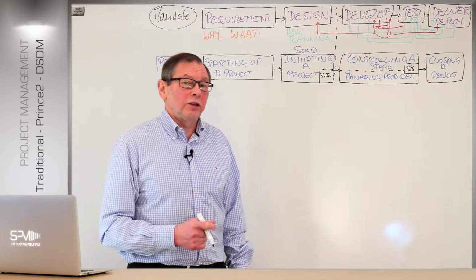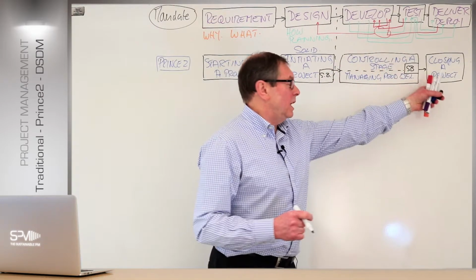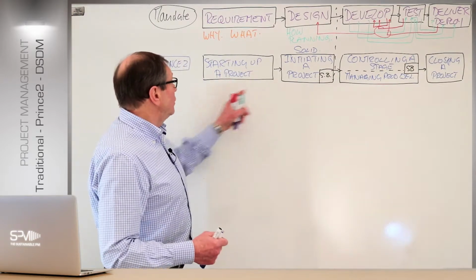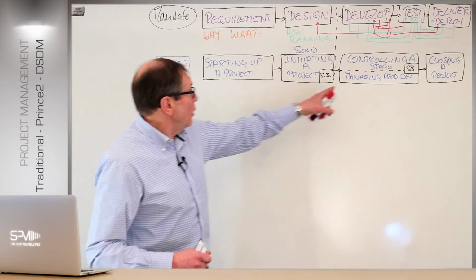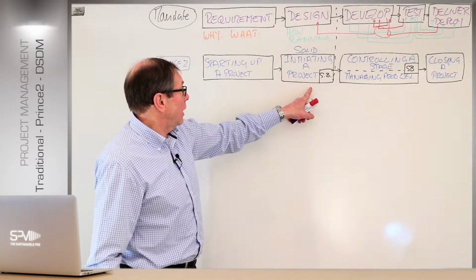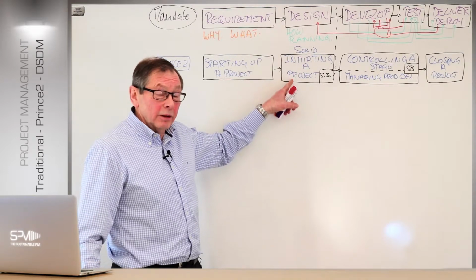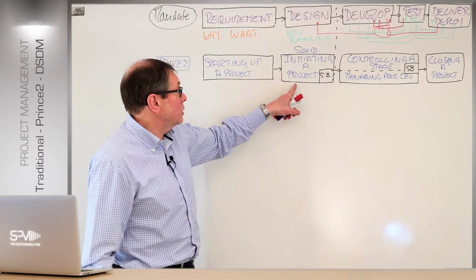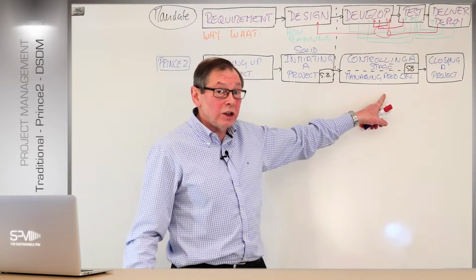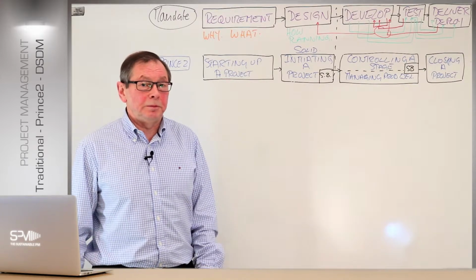We've had the objectives and they've been signed off. All right? The trouble is, if we follow the original waterfall and use that through here, of course, then we have problems. We get to the end of the project, and that's when we start to have difficulties. But you can see, at the end of the day, there's still really only four or five sections here: starting it up, formalizing it, initiating a project, getting all the planning in place, how we're going to manage it from a project point of view and the development approach, run that plan through the controlling a stage and managing product delivery processes by stages, increments, and then finally handing the product over. So now you can see the correlation between that one.